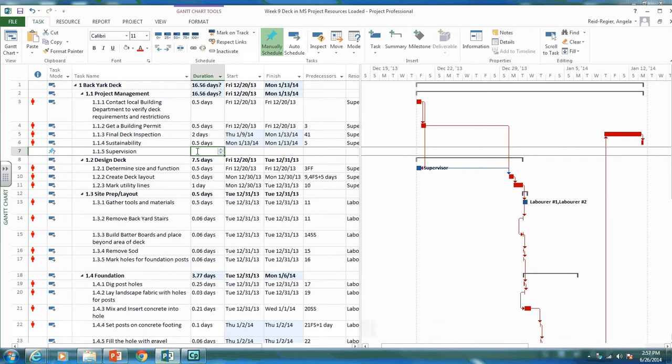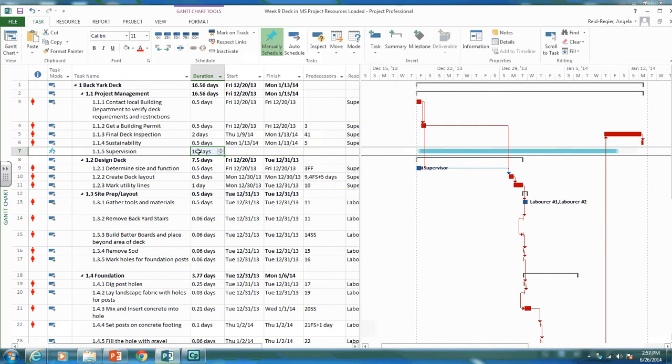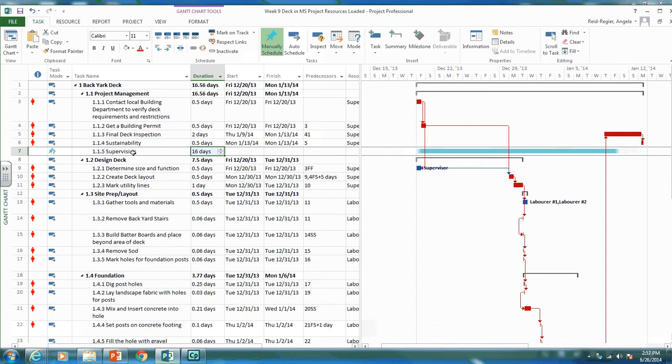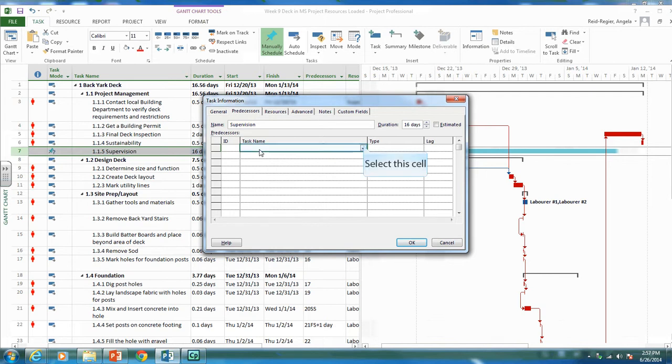Right now our project is about 16.56 days, so I'm going to put 16 days as my duration for this activity. It's the duration of the entire project. Let's click on this. The supervision activity will probably start once the actual project has started. Our first activity is contacting the local building department.